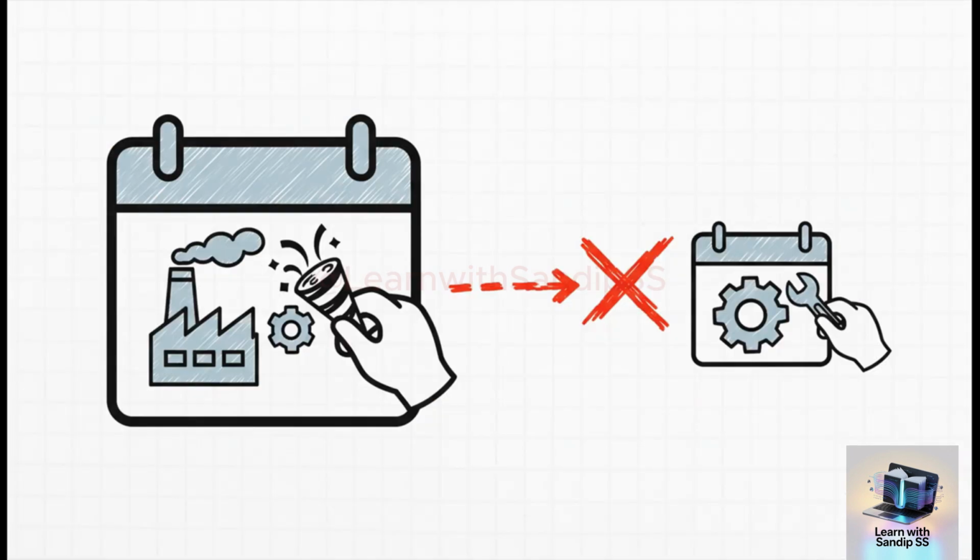And if there is only one thing you remember from this section, please let it be this. They are maintained completely separately. The system will not hold your hand here. If you add a new company-wide holiday to the factory calendar, it does not automatically update your planning calendars. You have to go check those manually.